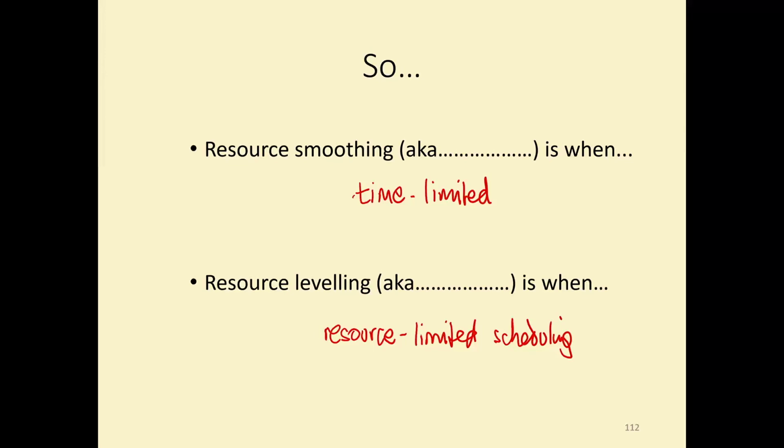Oh, because you'd be using people with a specialist skill set. Right, so just look at the term resource limited. Your resource manager might say to you, I'm sorry, I've only got 1, 2 people available. That situation often occurs in smaller organizations or organizations that are under pressure. But classically is where you've got significantly specialist resources.